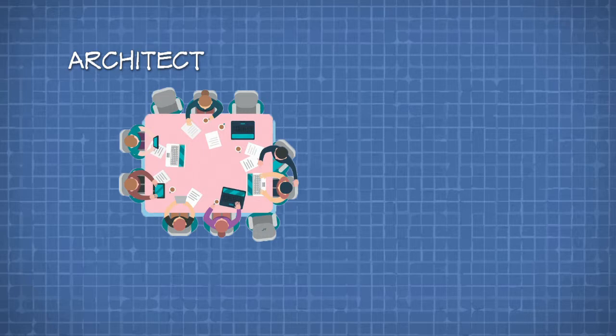The architect is also responsible for hosting client consultant meetings and technical coordinations to make sure everything's working fine. The architect has to inspect the building after its completion before issuing the certificate of completion and compliance, which means the architect is responsible for the completion and also the quality of the building.